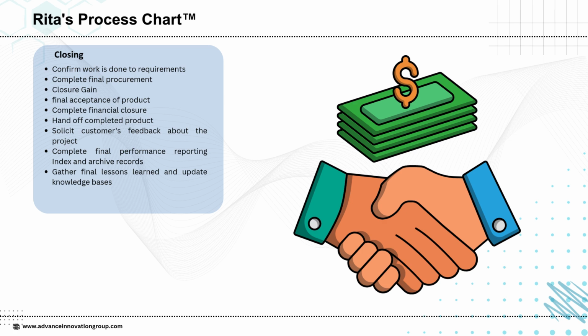Feedback from the customer is collected to evaluate project performance. Final performance reports are prepared, records are indexed and archived, and lessons learned are documented to strengthen organizational knowledge bases. This ensures that the project is not only completed but also leaves behind valuable insights for future initiatives.